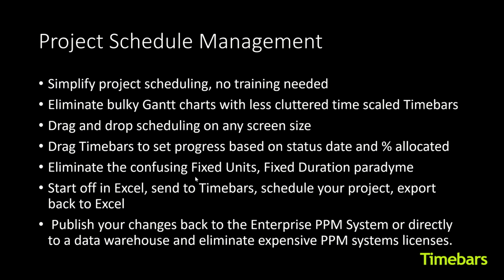Drag Timebars to set progress based on the status date. So you have your status date set, you drag the Timebar into the past, it'll progress it for you and set the hours based on the allocations and the duration. Eliminate the confusing fixed units, fixed duration paradigm that these more complex enterprise tools have. There's no need for that when you're using Timebars. Publish your changes back to the enterprise system or to a data warehouse.